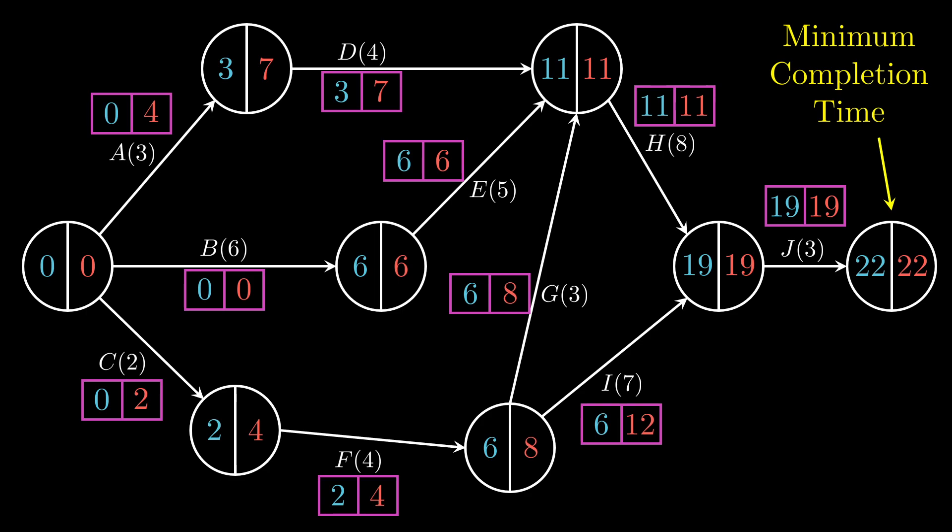Now if we look at each individual activity, let's just say we look at D first. You notice that he could start on day 3, but he could afford to wait until day 7 without holding anyone up, without delaying the entire project. So he could afford to wait for 4 days, and that's what we call the float time for D's activity.